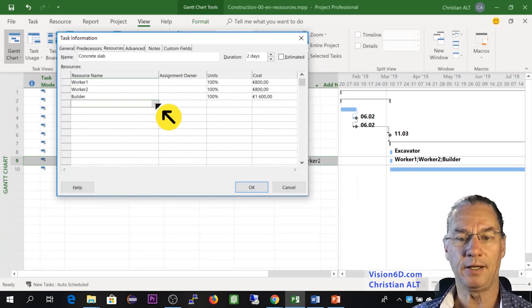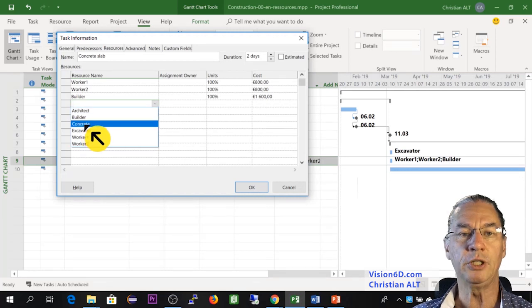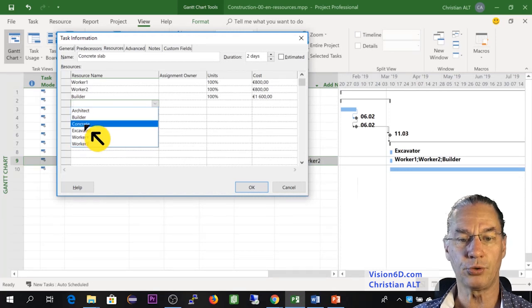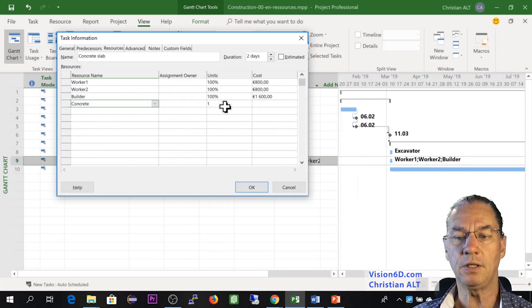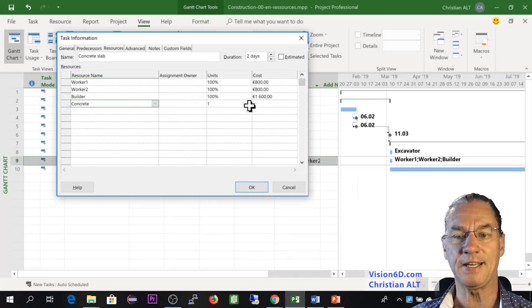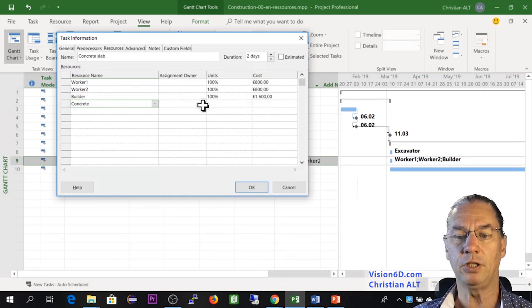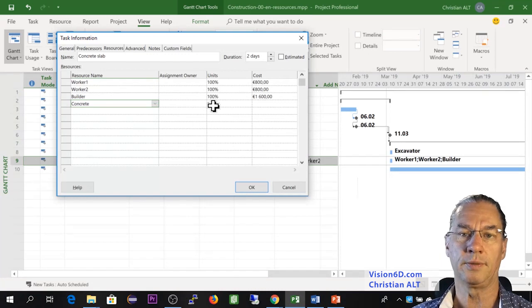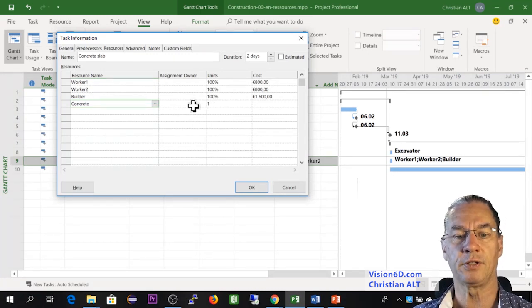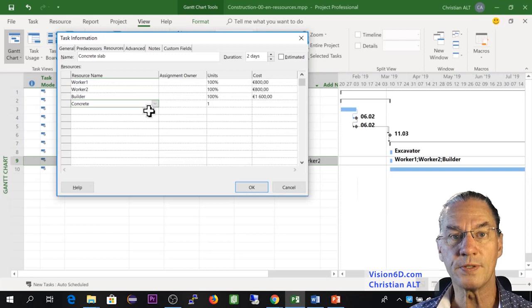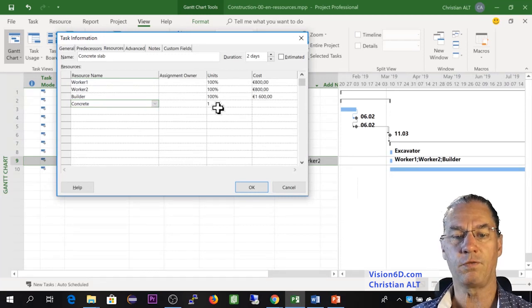So I'm going here down, adding an additional resource. And we said that we need some concrete to do the work. And you see here, we don't have a price that is calculated, but we have here by default, one unit. So that is to say that project is setting us on that kind of resource, a unit of one.